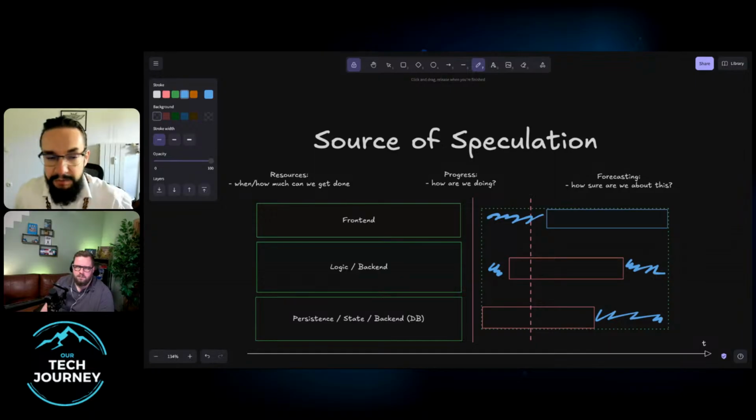And this happens a lot where teams are put together based on specialization, but they're not really working as a team because the horizontal slicing forced them to individuate too much. So they don't really own the whole delivery process as a team until everything is sort of kind of stopped and put together and rolled out, which happens here, right? So the output of such a slicing strategy for work, for tickets, for stories, is that inherently your batch size cannot be small. It is nearly impossible for this kind of team to work in small batches.